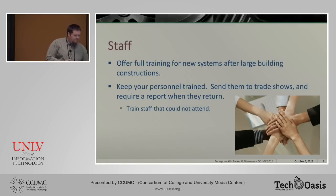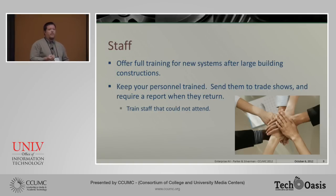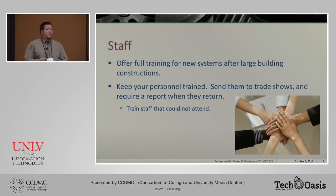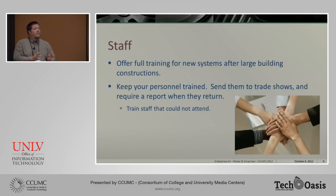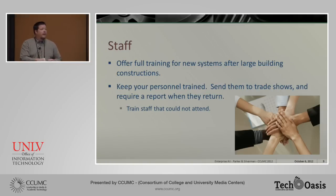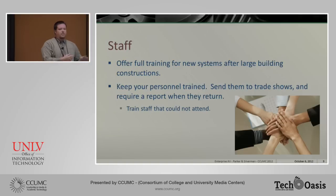Offer full training. After large buildings are constructed you want to make sure you've got a plan early on. The best case scenario: pick a room similar to all the others and plan to finish that room first, then have training in that room before classes start. In a large building project, if you're lucky they'll get the last room finished the night before classes start — that's not the time for training. Pick one classroom out of twenty that gets done first because you're doing training there the week before classes, and it needs to be bulletproof. If you can give that requirement early as a project manager, it smooths a lot of things over.